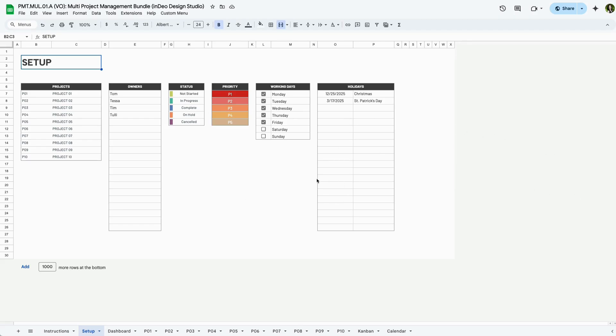And finally, you can add holidays that should be skipped in scheduling and duration tracking. Everything you see here will automatically populate and control drop downs and logic throughout the rest of the tracker.